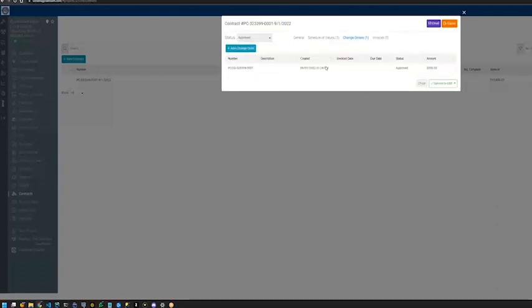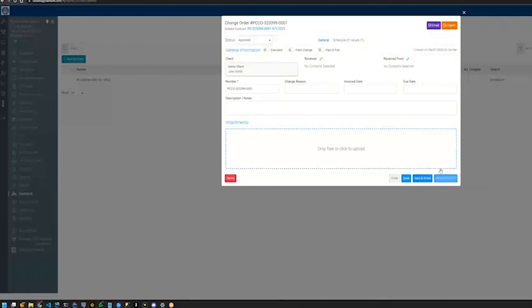So I've got this new change order here for this contract. Now the contract is synchronized, but if I click the change order, it is not synchronized. The synchronization of the change order is separate. It has to happen when they choose to. Now, it will happen. Let's say I have a contract and 2 change orders before I've ever synchronized the contract. That will synchronize the change order.